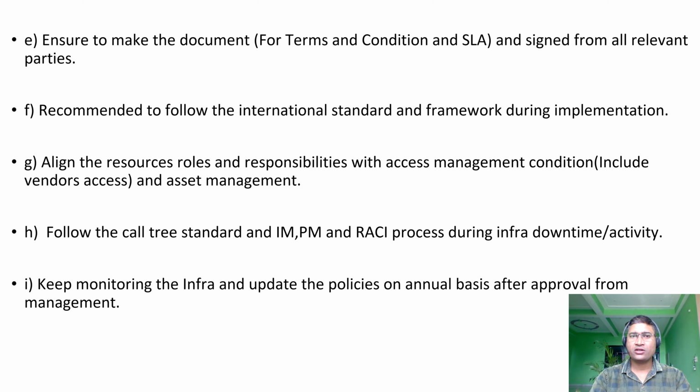Next, ensure you make the document for terms and conditions and SLA, signed by all the relevant parties, whoever the vendors are. Ensure you make a document for terms and conditions and include the service level agreement: what is the service provided by you, what are the troubleshooting services, and what is the window of support, because multiple vendors don't support in off hours. Off hours means during night hours.